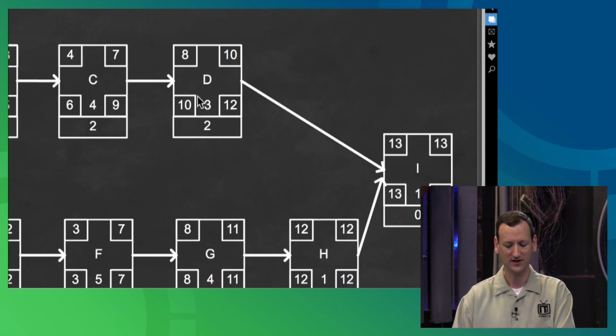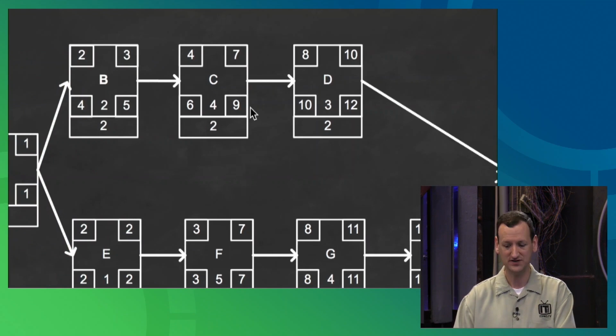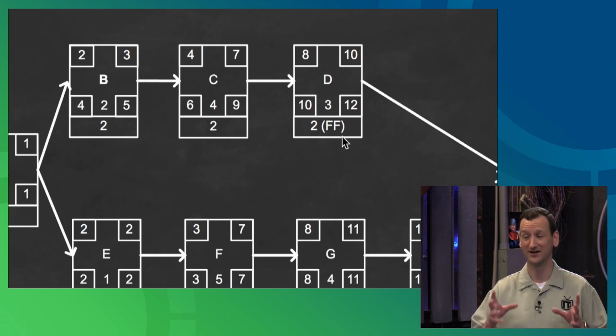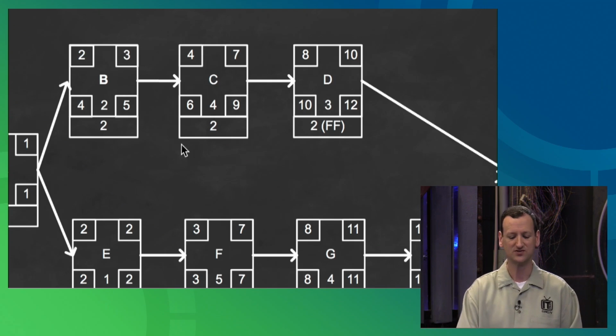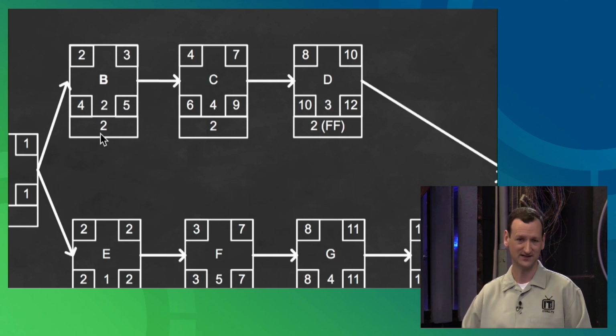That's called free float. So while I've got 2 days across the top here, this one is actually a little bit special, right? These are just regular old float, but this one is free float, and free float is worth its weight in gold. That's the one that doesn't impact your project at all. You don't really have to take any kind of special measures when you use it, versus these other ones that would continually push the other activities behind.